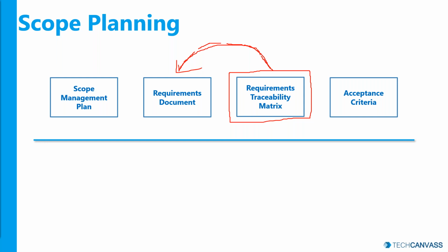What is acceptance criteria? Typically a customer agrees with you, as a project manager, and your team that this is how he would be testing this requirement, these are the steps, and he agrees with it beforehand, so that when you're actually placing the deliverables in the customer's hands, you and the customer know what to test and how to test, rather than leaving gaps for any slippage at that point of time, right?